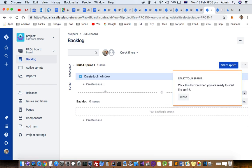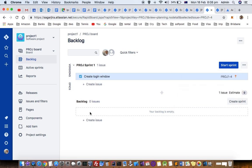You can move the tickets into the sprint like that. As soon as you move the tickets into this sprint, this start sprint button will appear, and then you can click on start sprint to start the sprint.